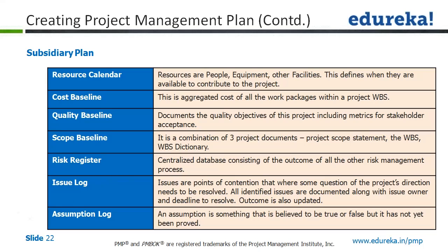Next term comes as a risk register. Risk register is nothing but a sheet of paper which would help us to document what are going to be the different risks, and this is also called a database of all the possible risks you can encounter. Those risks are taken care of in a risk response plan, wherein you will define a strategy to deal with that kind of risk.